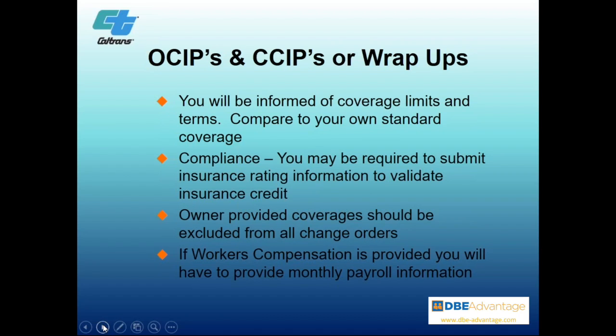Sometimes owners, for the total cost of the job, rather than ask the primes and subs to put it into their contract, get an umbrella policy. Other municipalities, I know some that we've worked for, want no insurance responsibility. They just give it totally to you as the contractors, both prime and subs.